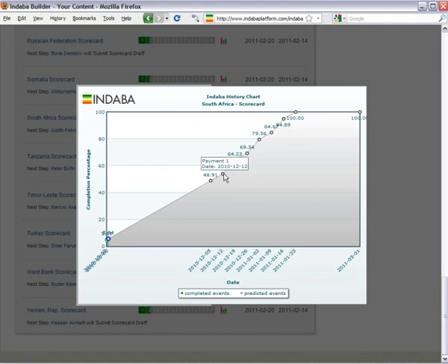And then from there, you can hover over each of these dots and you can see what the next steps are: editing, payment, peer review, all of these steps towards the final completion. And if this document gets done very quickly, you're going to see a very steep line coming up here as it zooms right up to completion. If it's stalled somewhere, you're going to see a horizontal line until you get that resolved, and then progress will resume. And what that lets you do is, one, see very quickly what the backstory is on a document.